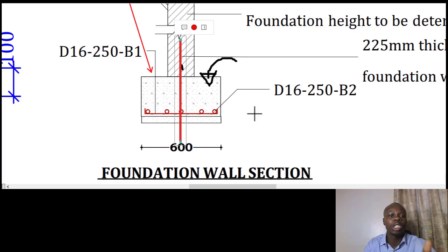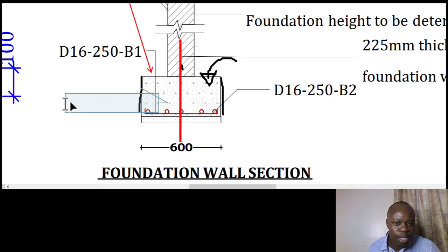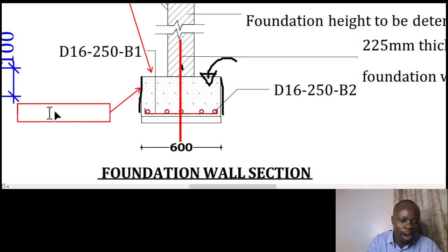But because what we need, the square meter that we need for the footing, is going to be on both sides, at the internal and external point, okay, at this particular edge, and then at this particular edge as well. So there is an internal side and then there is an external side. Okay, so this is the first point that we are going to have our formwork. So in this case, this is the formwork externally.